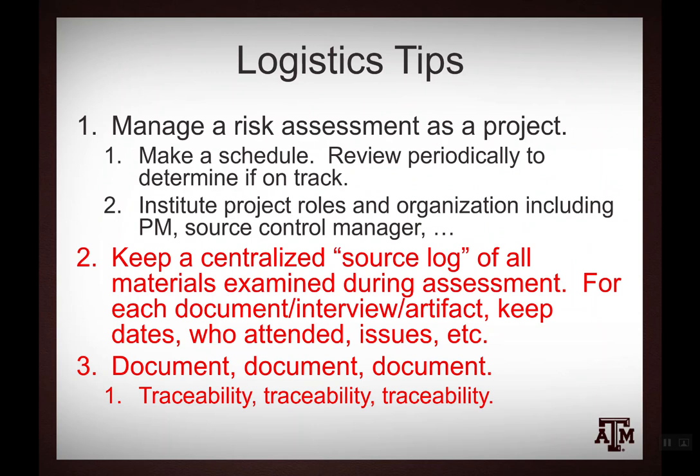So here's some tips for you. Manage a risk assessment as a project. You're going to have a schedule, you're going to have a budget, you're going to make assignments, you're going to have a team leader, good project management. And you're going to have periodic reviews to determine if the project's on task. And then, and these are mine in red, keep a centralized source log for all materials examined during the assessment. For each document, interview, artifact, keep dates, who attended, issues, etc. And then document, because you want traceability.